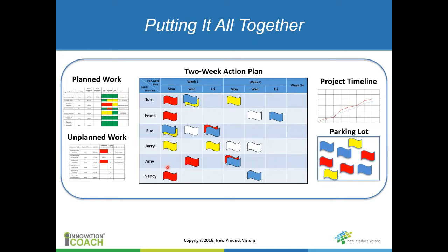First of all, at the end of that meeting, this column needs to be cleared. Nothing should remain on that column because presumably when they set that up, that was the date. It either has to be moved because the date's going to be later, or maybe it gets eliminated. In a rare case, there might be a task that was on somebody's list, but because of something else, the task is not required. So you have to move it to a later date, remove it, or maybe move it to another team member. There are only two or three things that can happen to those tasks, but it all has to be cleared at the end of that meeting.